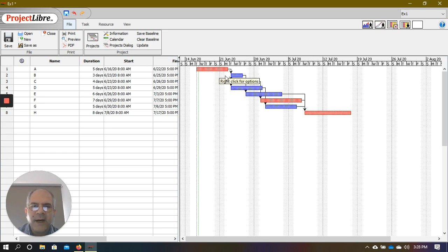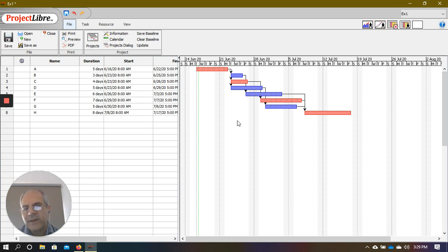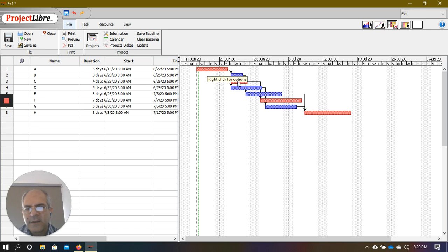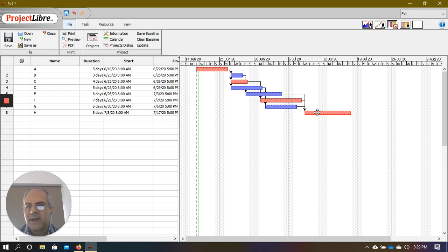Also notice the bars have different colors. Certain bars are blue and certain bars are red. The red bars are part of the critical path, while the blue bars are not on the critical path. From this we can see that A, C, F, and H are critical path activities.